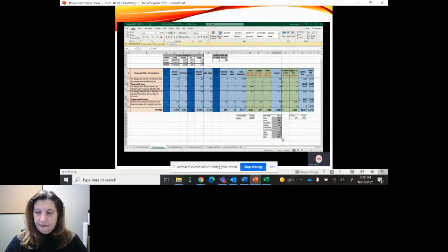So if I want to see if my spreadsheet is working correctly, I can compare these numbers for each of these items and manually compare them to the budget detail. We could also rig up an automated way to do that. So that's just a QA check to make sure that the things are linked. Here's one I was just trying to QA how I did the math for indirect to make sure that was all working correctly.